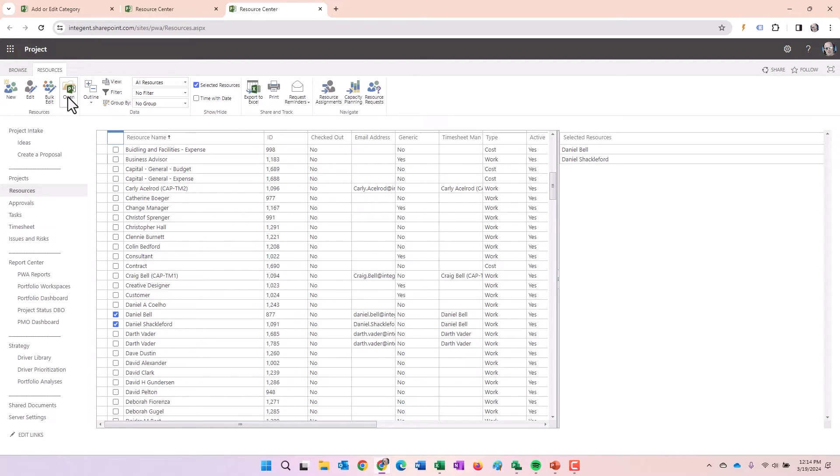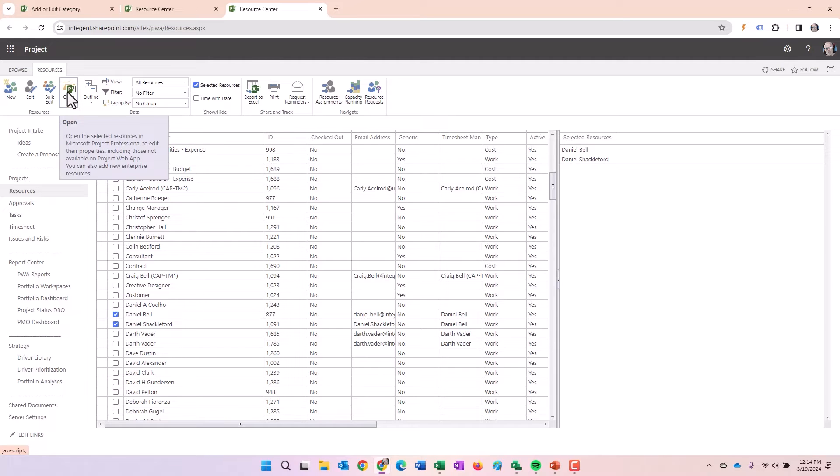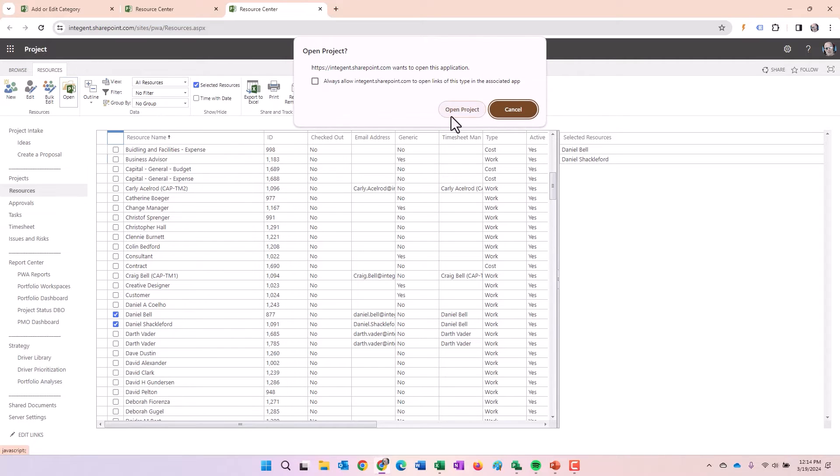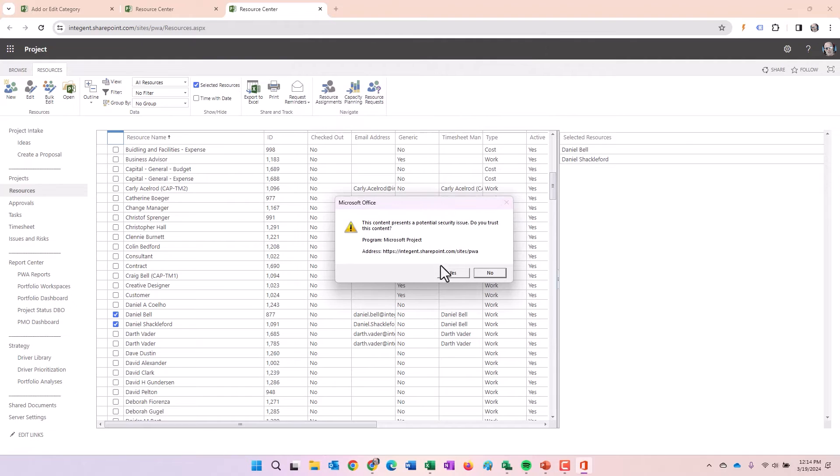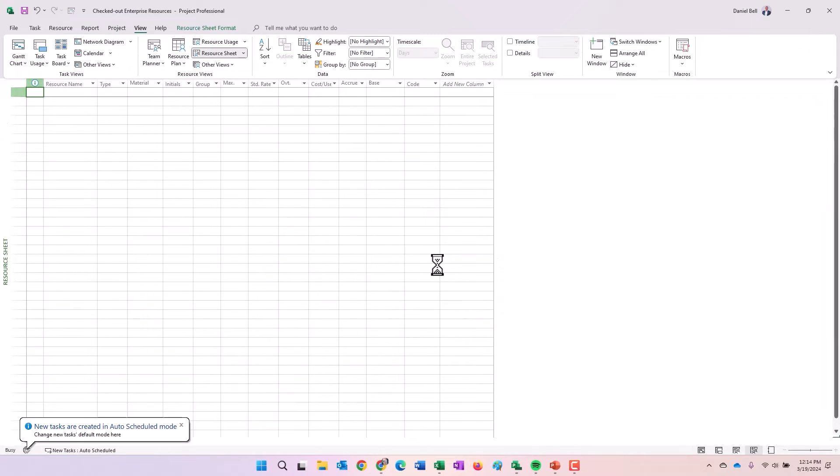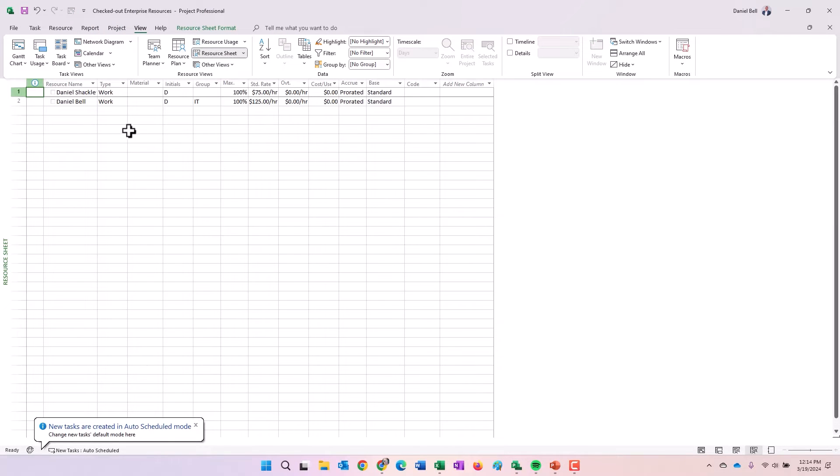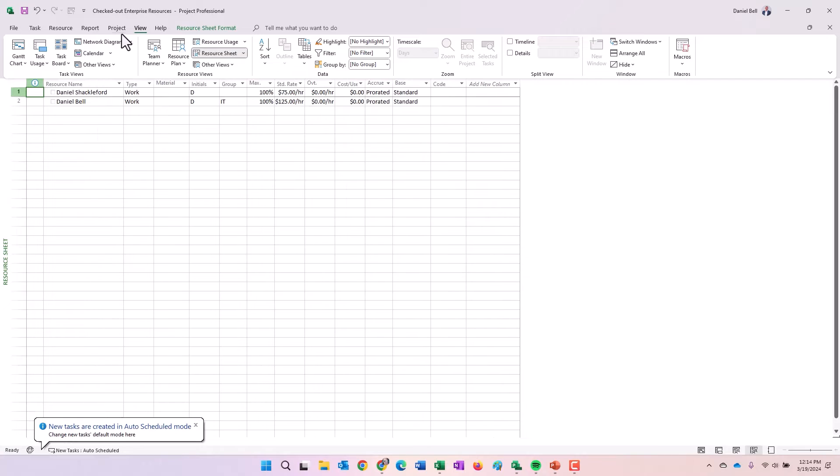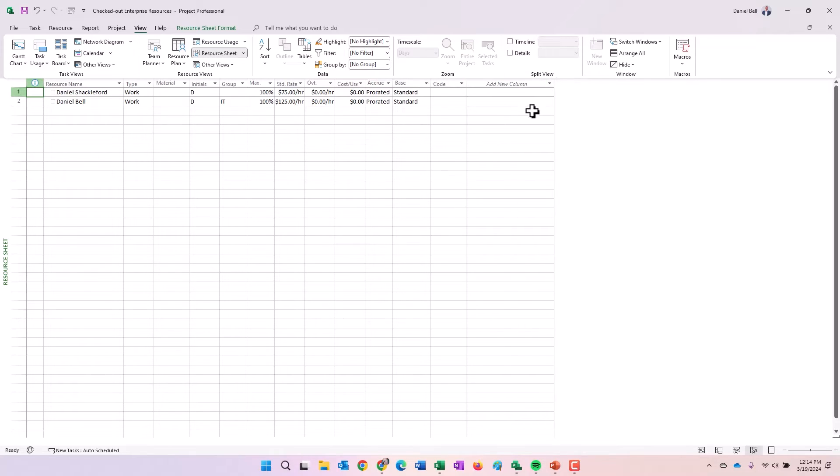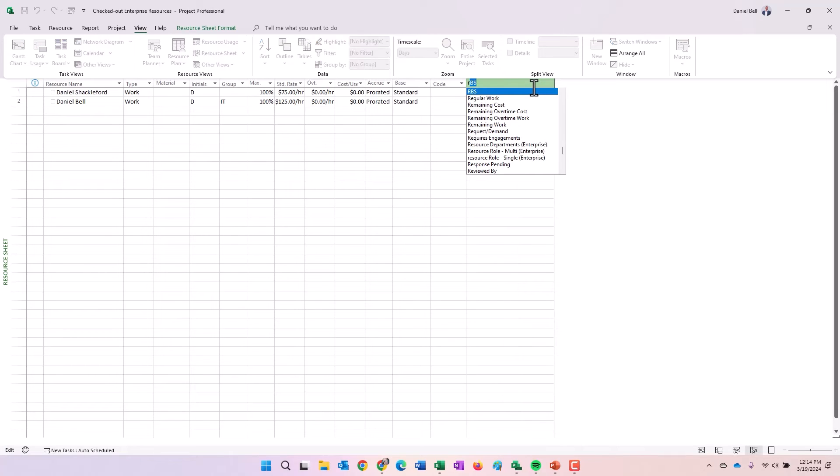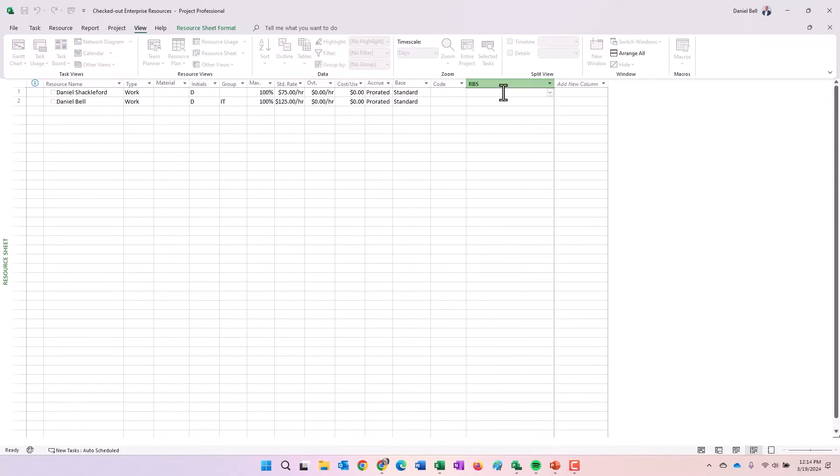And there's me and there's Daniel Shackleford. What I'm going to do is open these resources for editing in Microsoft project. Click this open button here, right in the resources ribbon, click open project, select yes. And then the resources get opened up in a resource pool as checked out enterprise resources. Therefore, any changes I make here, when I save and close and exit, those changes will be saved back to those resource records on the enterprise level. What I'm going to do is add the RBS field in here.